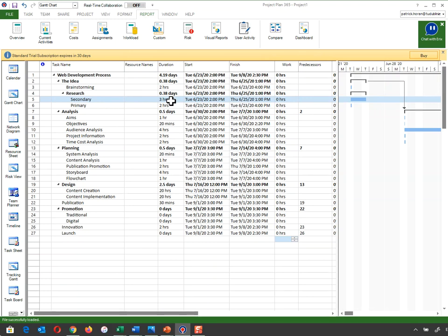It's like my glass of water scenario. You know, it actually puts them all into the one start time. So it means that I can fill the glass at the same time as I get the glass, at the same time as I switch on the water, which I can't. So everything has to be put into the order that it appears in. Okay, now that's only looking at the main tasks.